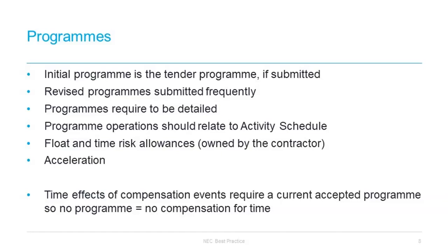In the unamended NEC contract, at least, the project manager cannot force acceleration, even if, and this is quite important, even if the contractor is in delay. So even if it is a delay caused by the contractor, and therefore the contractor is not going to complete at the completion date, but is going to complete later than it, the contractor does not have to accelerate, and in fact the contractor doesn't even have to provide an acceleration quotation. The contractor is in complete control over what the cost and time impact of any such acceleration would be, and they would set those out in their quotation.